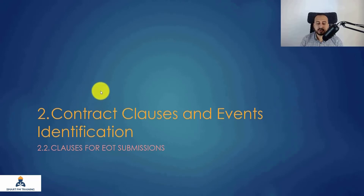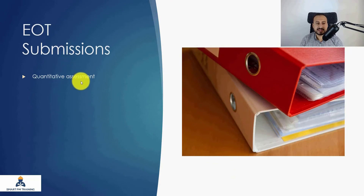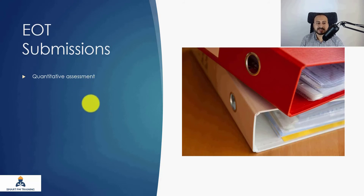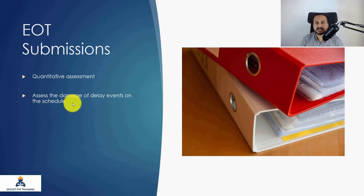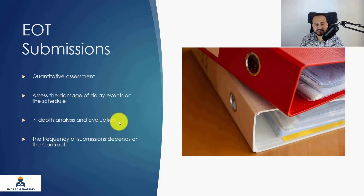In the last lecture we covered the clauses for notices of extension of time. Now we will talk about clauses for EOT submissions. Unlike the notice, the EOT submission itself is a quantitative assessment — you use Primavera, go through all activities in high detail, and at the end the submission gives you the proper entitlement. It assesses the damage of delay events on the schedule, giving you a clear understanding of how much delay each event is producing. It is an in-depth analysis and a large submission covering everything about what a certain event is doing to the project schedule.